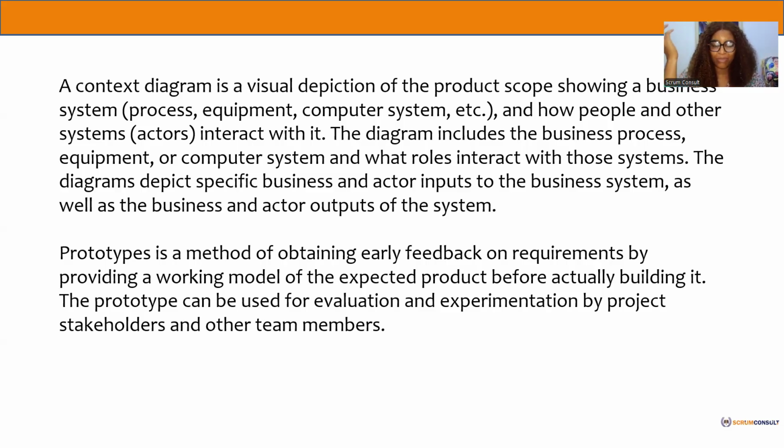Sometimes it could be a prototype. A prototype, most times, is just a mini version of your project. Most times we use these techniques with our stakeholders, like prototyping. They come up with an idea, you create that mini version to present to them for validation. What I do in most projects is that before I even go in, I validate their ideas, because a lot of people can dream.